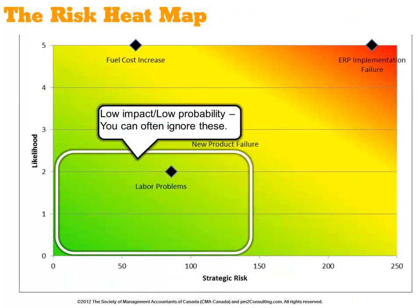Now, to read this: any risk that appears in the bottom left corner, where it has a lower strategic risk and lower likelihood, are risks that in all cases you can probably just ignore for now.